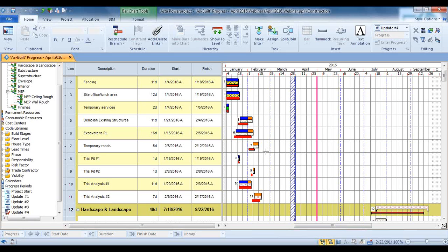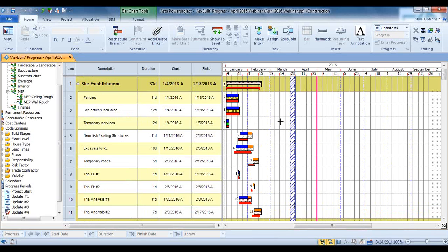But if you can send every subcontractor a schedule of their activities, it will help them better see what's going on with their work, see where they maybe are slipping or close to slipping, and how they can help the job be successful. Saying that, it can take a lot of time. If you have 30 subcontractors on a job, that's not usually a very quick thing to do. Not everybody has that time, so usually they just send the whole schedule out.